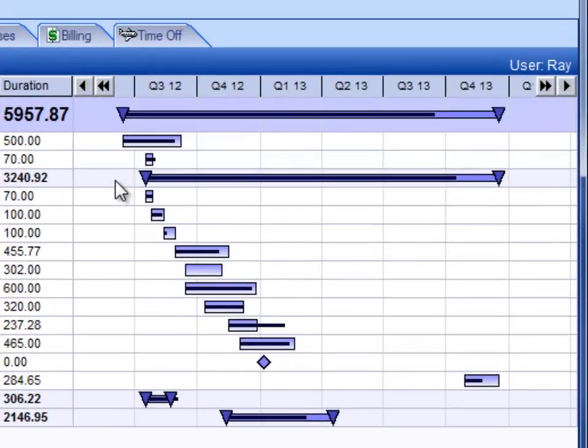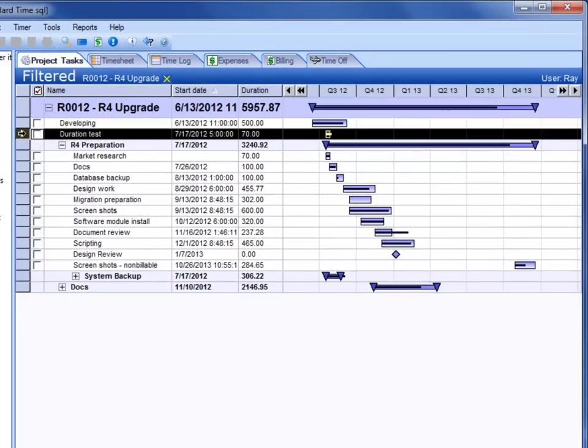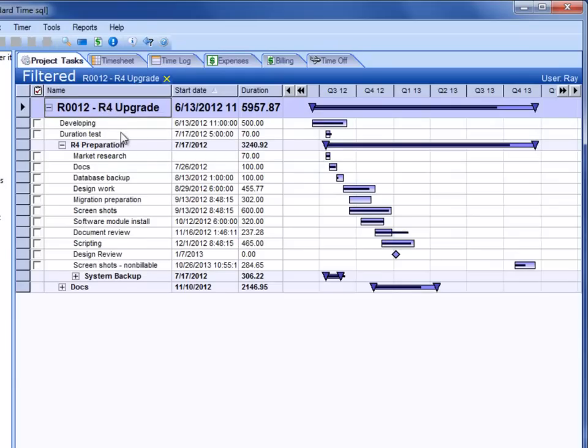So over on the right hand side, each of those bands, or rows, have different symbols in the Gantt chart. So in the project, you see a long bar here with triangles signifying that all of the tasks are under that umbrella. You then see a few tasks that are just assigned to the project itself in these white rows.